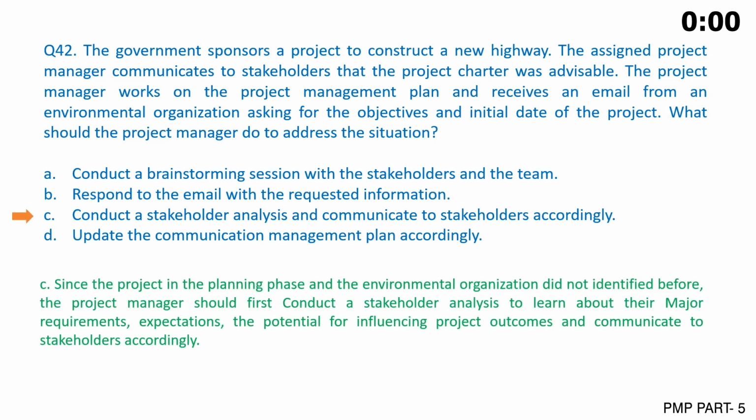The answer is C. Since the project is in the planning phase and the environmental organization was not identified before, the project manager should first conduct a stakeholder analysis to learn about their major requirements, expectations, the potential for influencing project outcomes, and communicate to stakeholders accordingly.